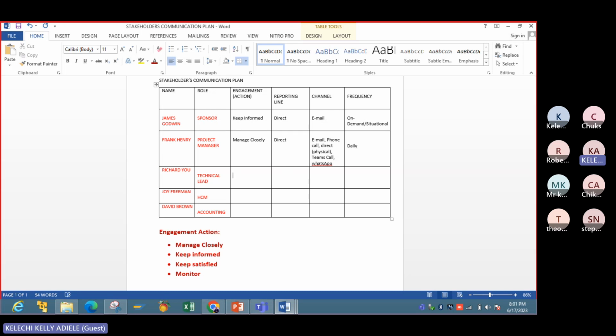Okay, let's rush this out. The technical lead, we have to most likely keep informed because we don't have direct contact. He reports to the project manager.